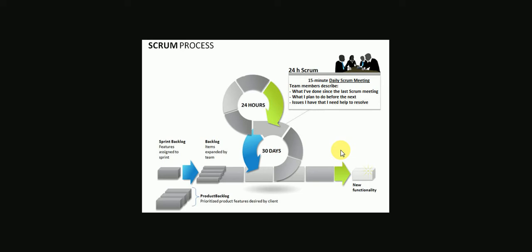So as to avoid that, nowadays agile, and typically the Scrum methodology in agile software development or software project management, is becoming more popular. The main advantage of agile is you don't freeze the requirements for a time period. Business analysts will get the requirements from customers. They will park those enhancements, in terms of high level features, in epics or features. They further break them into a number of smaller enhancements or smaller functionalities, which they call user stories.